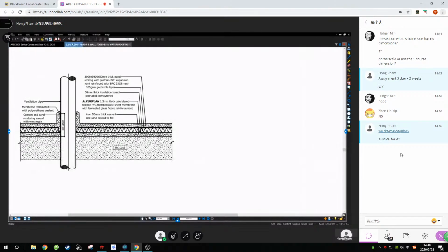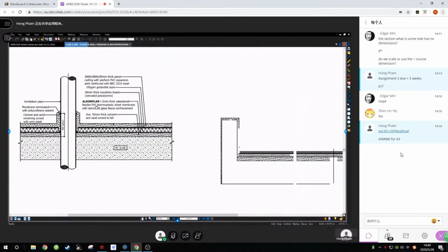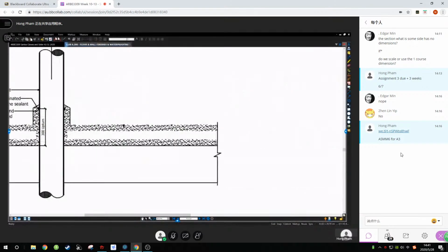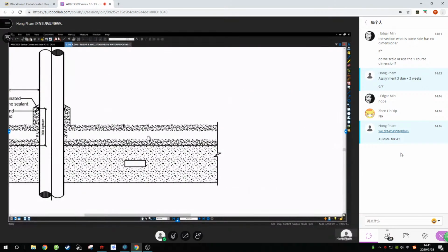Yeah, this is the waterproofing membrane sections. Okay, for example, this is one of the Singapore projects that I have. So guys, this is the RC flat roof, and this is where they need certain pipe penetrations. If you have this happen, it's got to be in number. Okay, you measure this item in number. So we take a closer look. Since it's the RC slab,